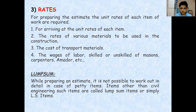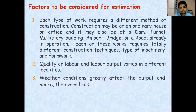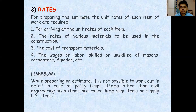There is also a lump sum amount kept in the estimation for petty items — small extra materials, hiring a person for minor work, bringing in planks of wood, etc. For example, two percent of the total project cost may be kept as a lump sum amount, which is used for these miscellaneous works.